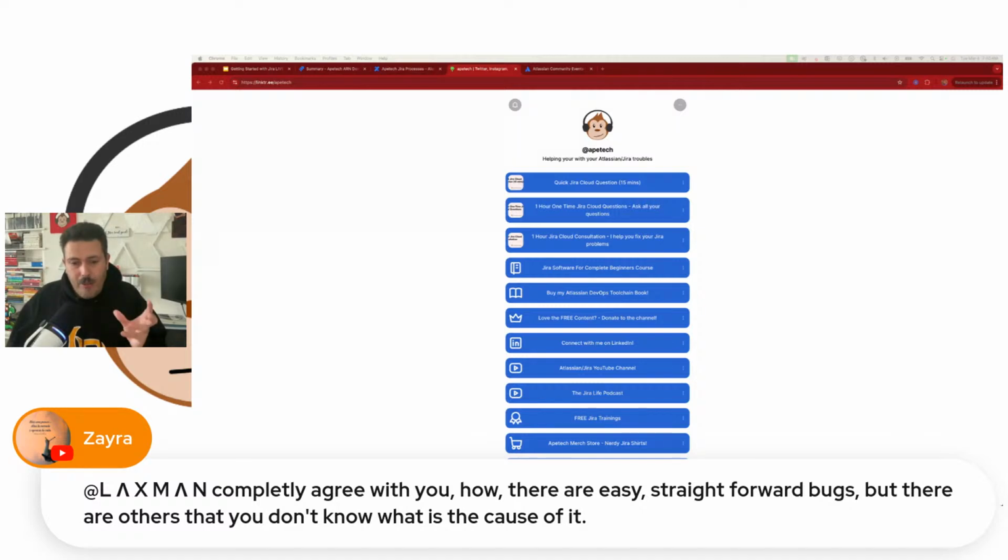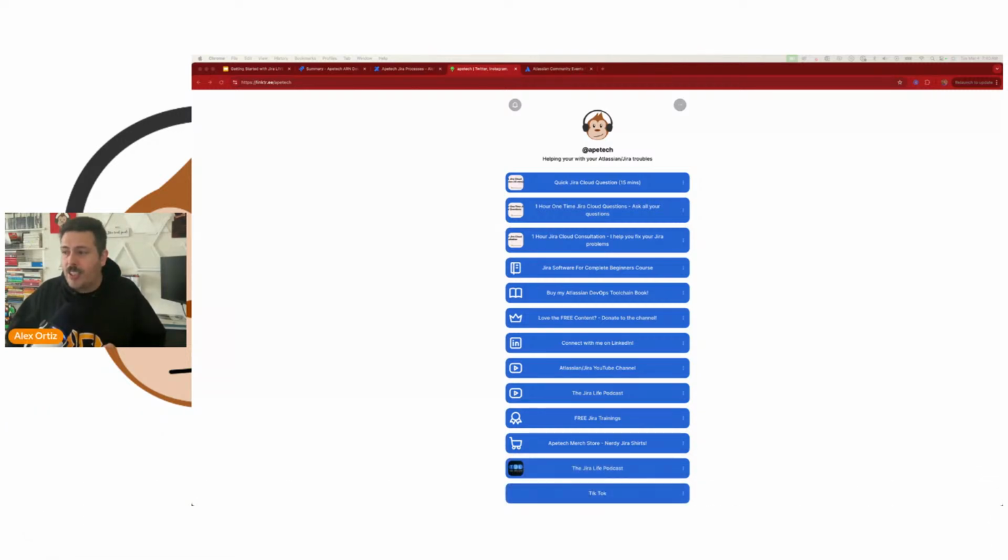If you're not careful, your bugs will dictate your sprints. They'll dictate your entire outlook on all your projects, because your team is going to have to reverse engineer the whole thing. So you want to be very, very careful with your bugs, and give them the right level of attention they need. Adjudication before your engineer goes to work on a bug is very, very critical.